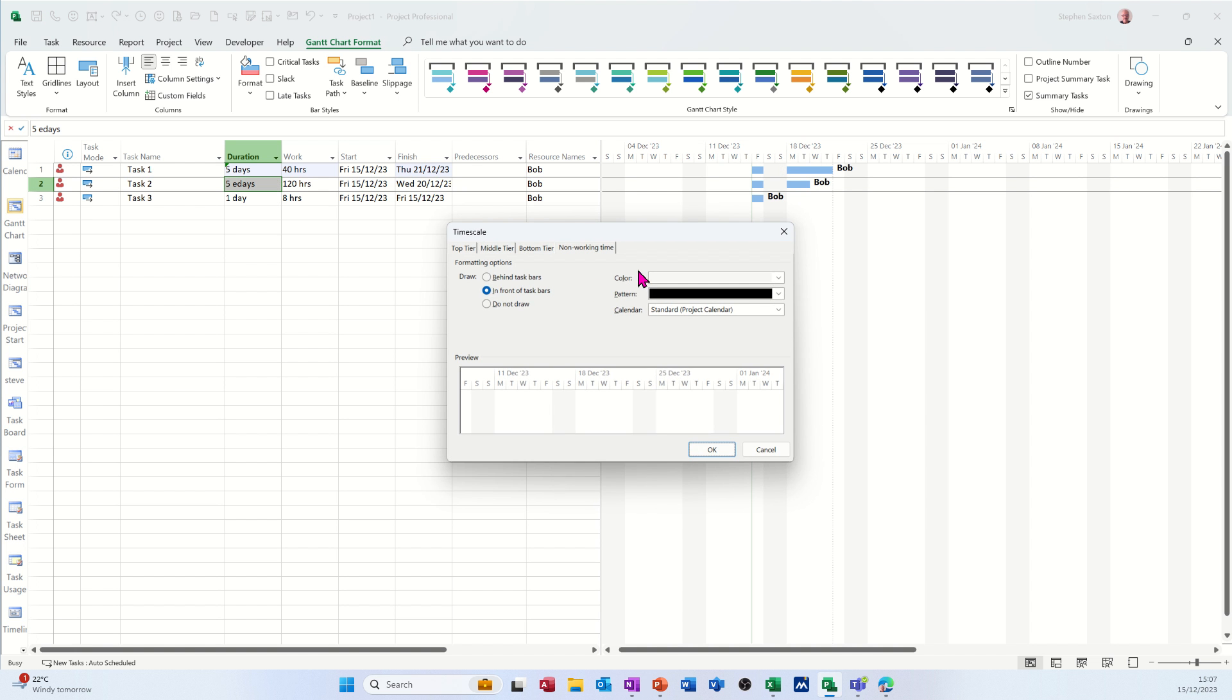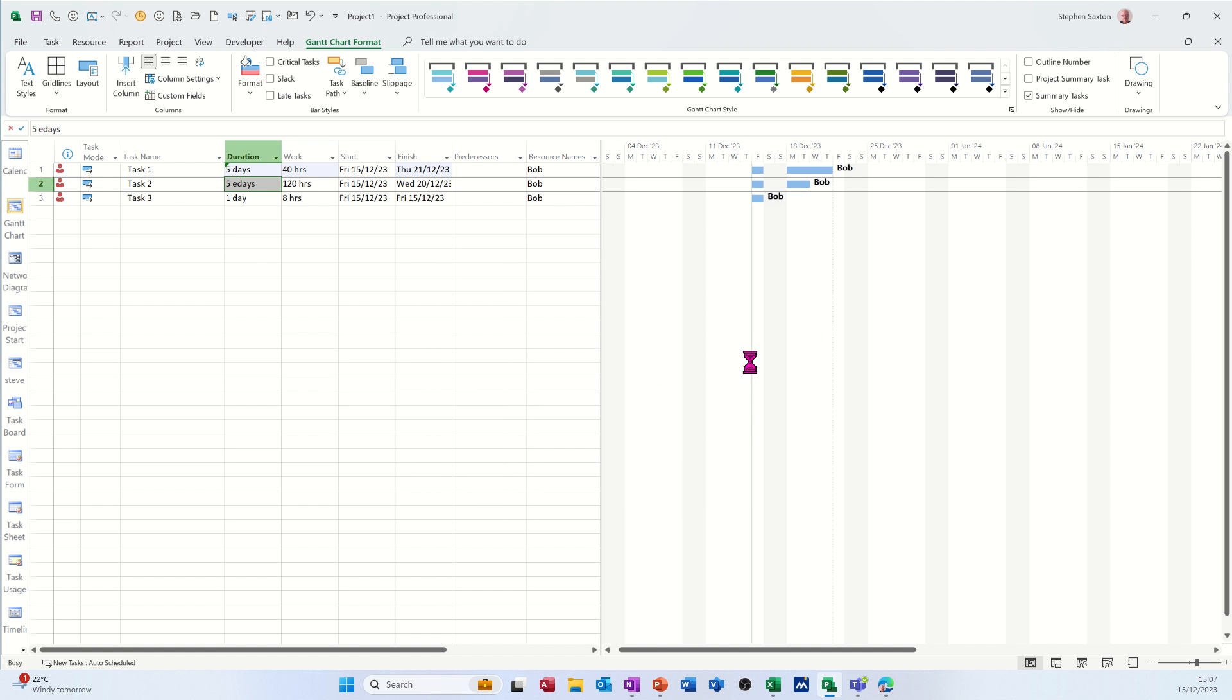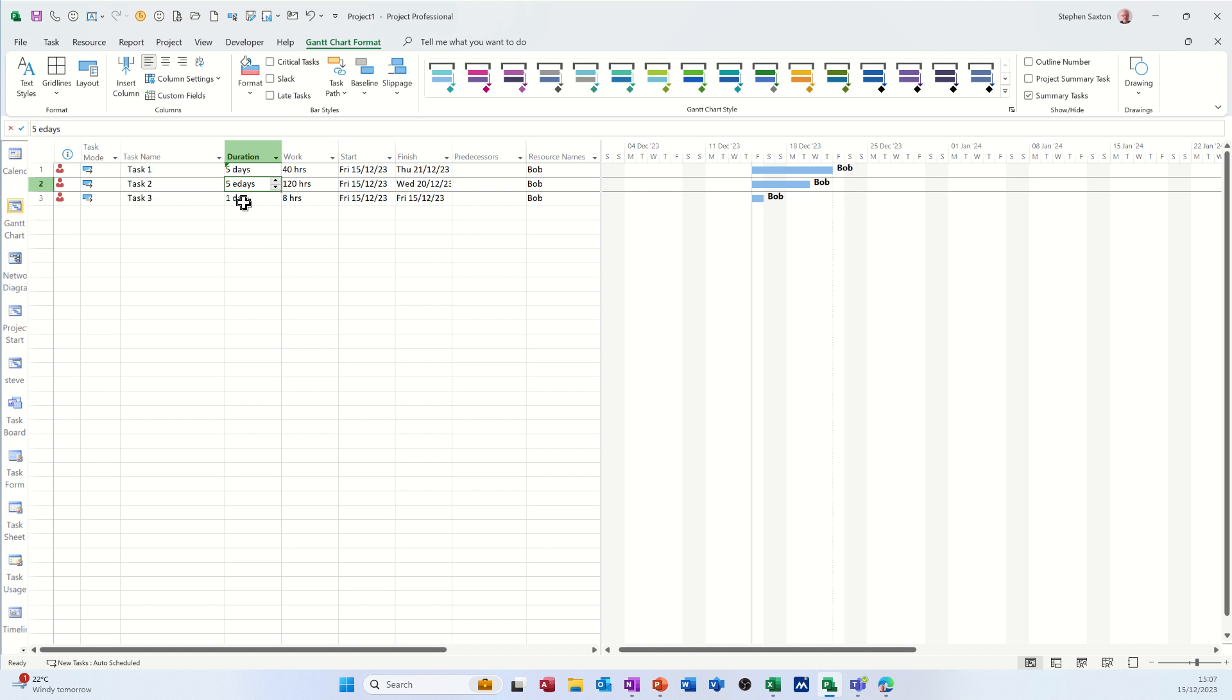So that's just working days. I think actually if I just go the other way it's a bit better. Put it behind task bars, it's obviously a bit better. Whereas this one is just elapsed time including working days. If you put e in front of it, it's elapsed time including the weekends and every hour in between.